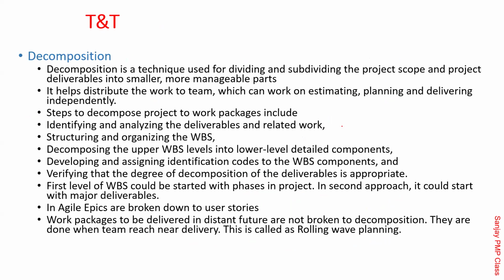Decomposition, as you have seen, that whole tree broken down into the levels below is called decomposition. Now look at it here. What I explained will start making sense. Decomposition is a technique used for dividing and subdividing the project scope and project deliverables into smaller, more manageable parts. It helps to distribute the work to the team, which can work on estimating, planning, and delivering them independently. Now that chart will tell you what this is.